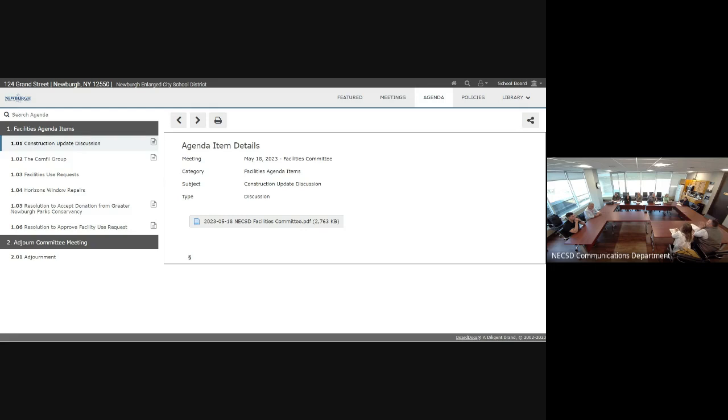Do you have any updates on the HVAC equipment delivery schedules and any implications for those dates? We do. We've passed them out to the district this week. As far as the mechanical units themselves, everything is coming in on time. There are a few things being released in July, some of the RTUs going on that building in Heritage, but we feel that we'll have them in time and installed in time and ready for school opening.